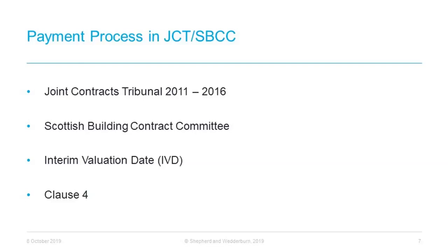Across the JCT suite of contracts, payment provisions are contained within Clause 4. There has been an effort to simplify the payment and valuation mechanism and to ensure a consistent JCT Construction Act compliant approach throughout the supply chain. The parties specify in the contract particulars what the first IVD will be. Thereafter, the IVD occurs on the same date each month.